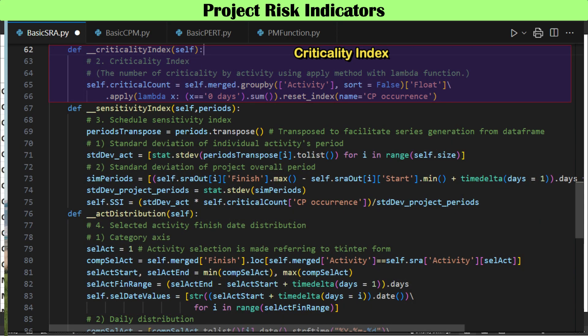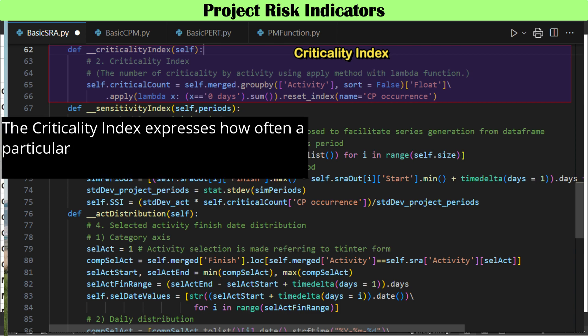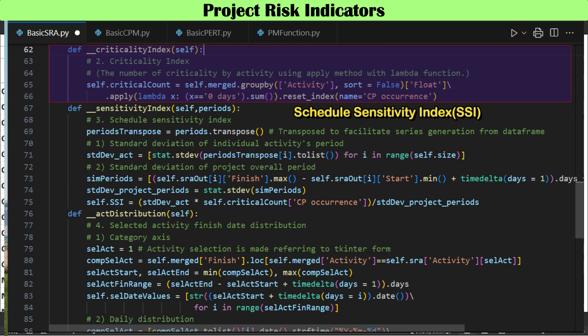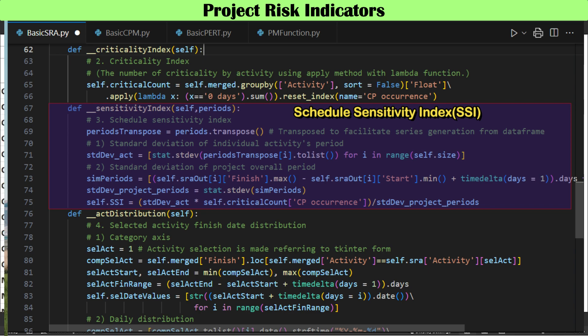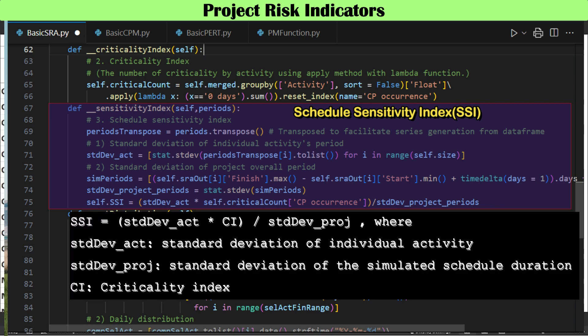The criticality index (CI) is mainly used in risk analysis. The criticality index of an activity or task can be expressed as a ratio. During Monte Carlo simulation, activities can join or leave the critical path for any given iteration, and the criticality index expresses how often a particular task was on the critical path during the analysis. The schedule sensitivity index (SSI) measures both the probability and the impact of variability in activity times and is known as the most reliable sensitivity metric. While CI measures the probability that each activity is critical, it says nothing about the impact of delays.